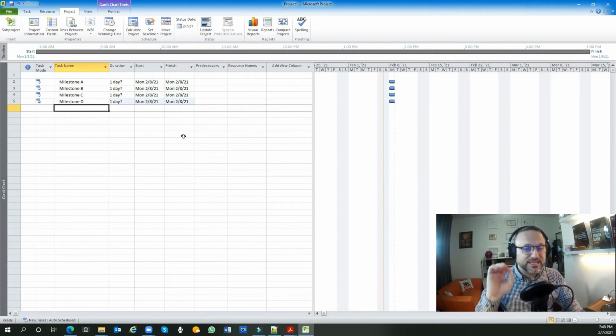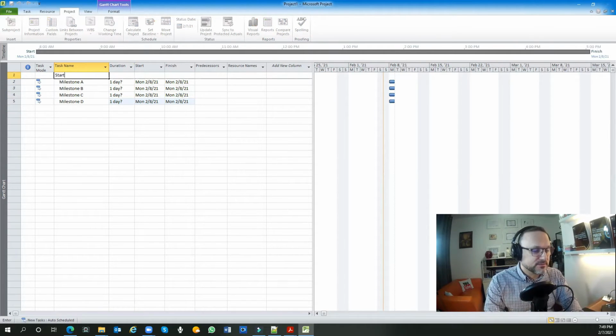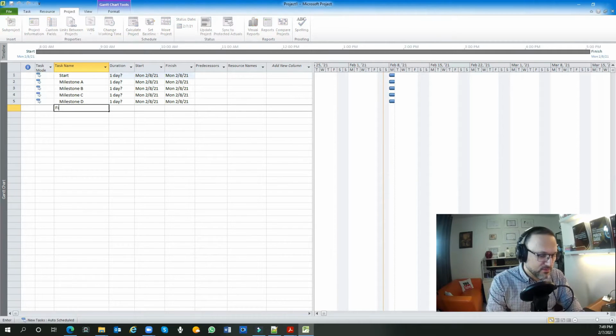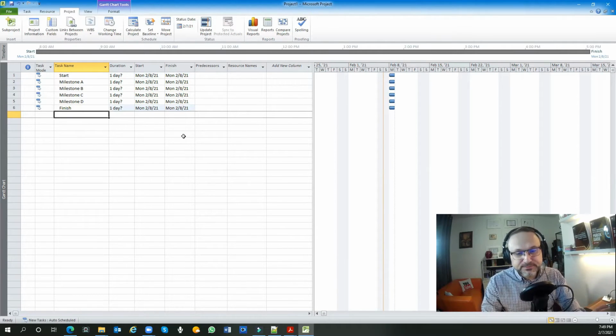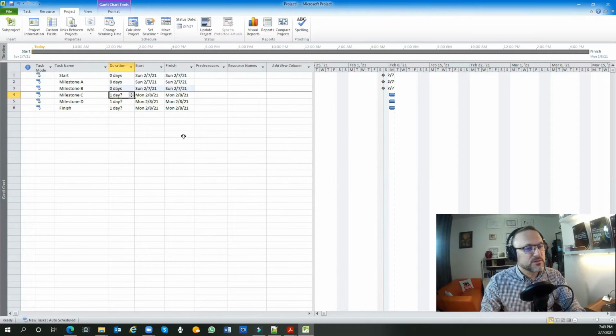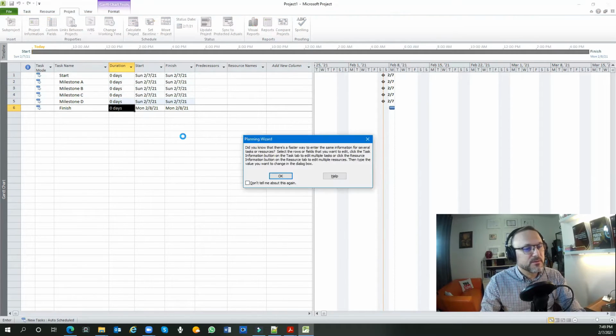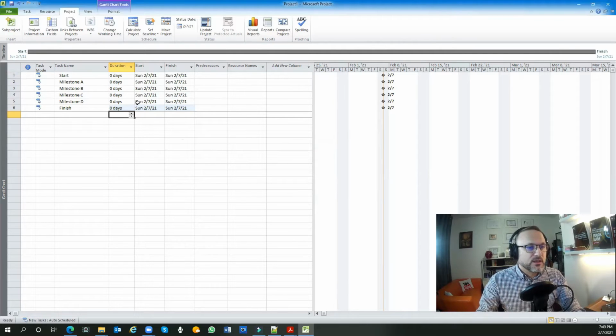But in each and every project, what we said, a project is a temporary endeavor. That means a project definitely has a start and finish. So we have to define milestones as start and finish. Okay. Now, because it is a milestone, I will put here 0 days. Just mention 0 days. Okay. Don't worry about those dates. We will come to it later.